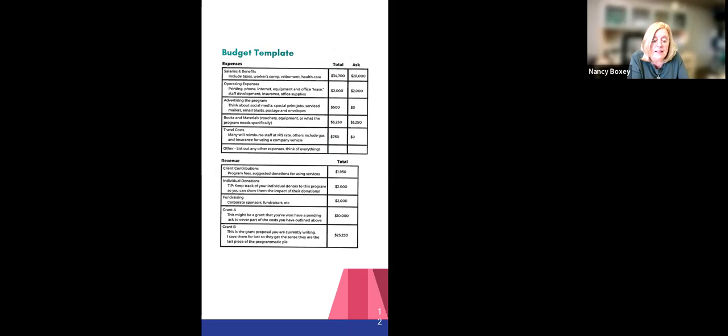And so that really necessitated a call to the applicant to say, well, how did you come up with this number? And while it's kind of a ballpark number, no two ramps are the same because houses are different. You might have a 1 foot versus a 3 foot incline. You might have a longer distance from the driveway to the front door. You might have radiuses. So they were just looking to get 2 ramps that could then be retrofitted per client. And so we really had to have that conversation of, okay, they're all different, but has a ramp been built recently by this fabricator? And how about you provide what that estimate was?